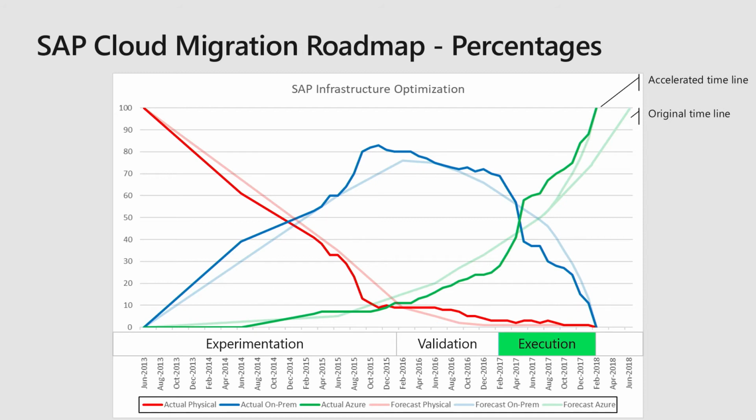Then we have March quarter end, which is Q3. It's not a huge quarter for us. It's a good kind of baptism by fire, but it's a small fire. And then we still have April and May before the big June annual close happens. So that's really the big fire there. And so we said, if we migrate in February, we have 5 more critical events where we can test this out, make sure it's sized right. And I'm not saying we did testing in production, but you want to have a little bit of safety buffer and don't want to be too risk friendly. And so that worked really well. We finished actually 6 months ahead.